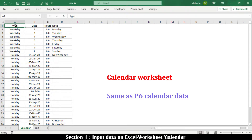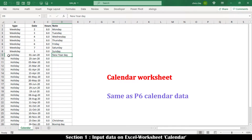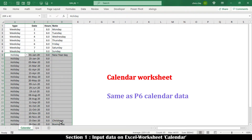The worksheet named Calendar defines project weekends and non-working days. The format is similar to P6 calendar data.